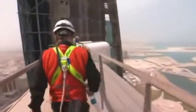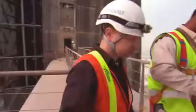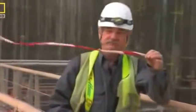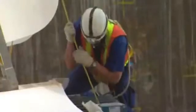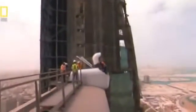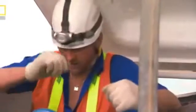The Danish team goes to the top bridge to assess the situation. 133 meters above the city of Al Manama, they prepare the generator. The wind measures 25 kilometers per hour, higher than the cutoff speed of 21. It's not perfect, but the forecast isn't good either. If they lose this window, they may have to wait days before they get the chance again. It's a tough call. The lift crew waits for the go-ahead. But the final decision remains with the Danish team.